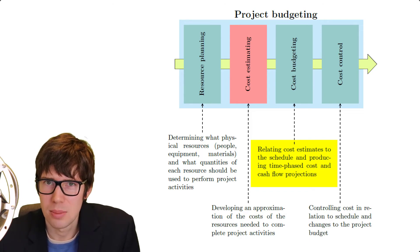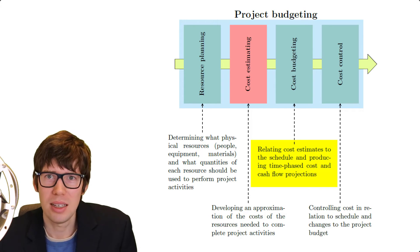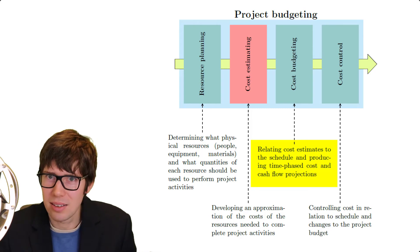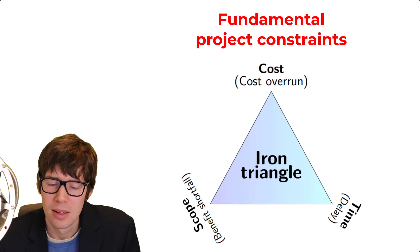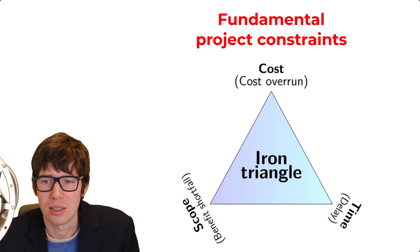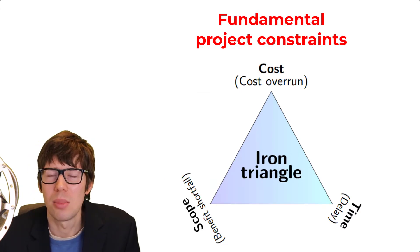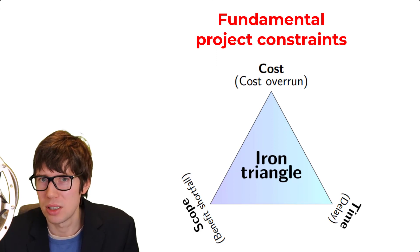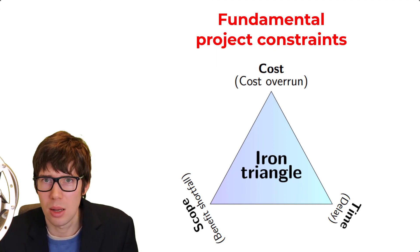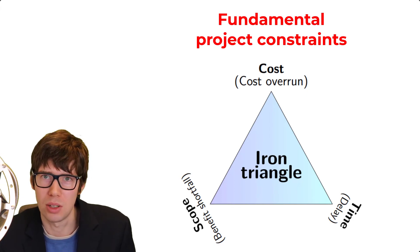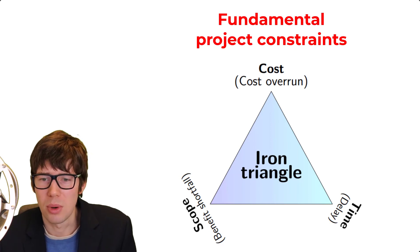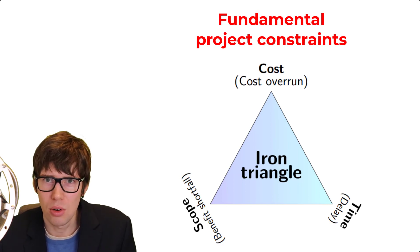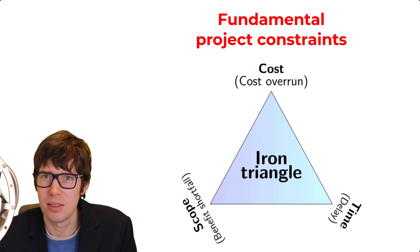The third stage, which sequentially comes after resource planning and cost estimation, is called cost budgeting. Cost budgeting is basically about taking the cost estimate and disaggregating it — spreading it across the schedule — so we're adding a time dimension. Most people believe that budgeting is only about the cost constraint, but remember, a project has three fundamental constraints: time, cost, and scope. Budgeting is not only about cost; we've already seen the scope dimension in resources, and now we're also adding the time constraint.